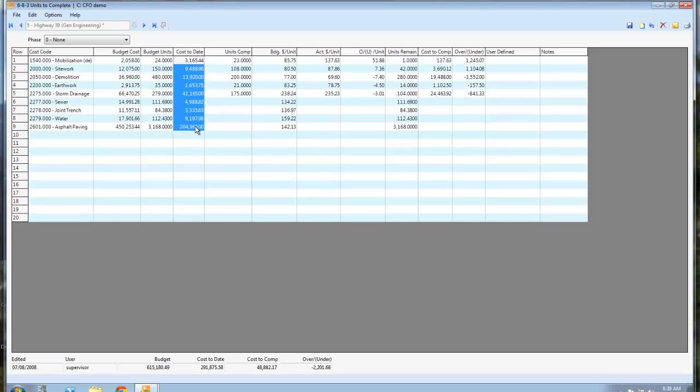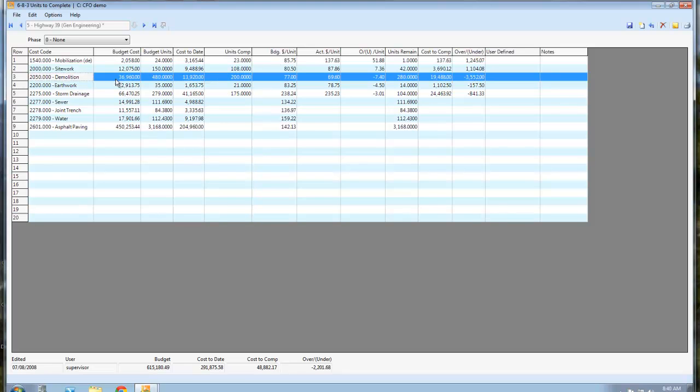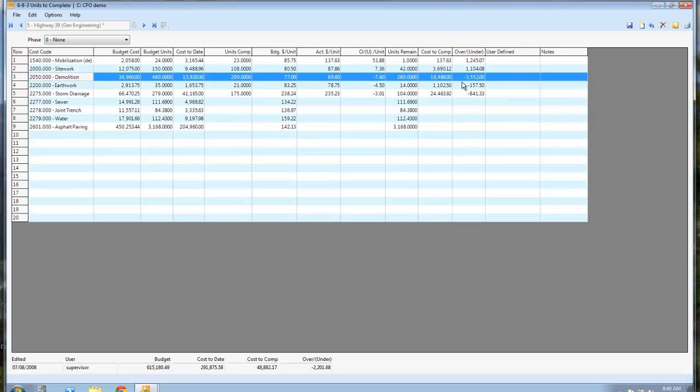This is the cost that's coming through the accounting system. So this is your materials, your equipment costs, your payroll costs with the burden and fringes and what have you. Then once a week, we're going to ask your guys to report the quantities completed at the end of the week. And then it's going to calculate out—I'll just pick a line here. So in this case, we have 480 units to do, we've completed 200. I budgeted $77 a unit, but I'm spending $69 a unit. So I'm under by about $7. You've got the idea going across here. So the bottom line is, this is pretty useful as the job goes on. Because sometimes invoices may be late coming in from your vendors. So it's not exact per week, but at the end of the job, before I bid that next job, I can go in and see what my unit costs were on the previous job. Because these quantities are all going to be updated and all my cost is going to be in.